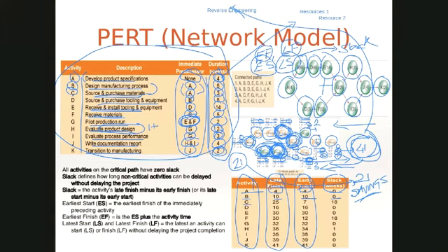C says latest finish is 25 weeks, and earliest finish is 7 weeks, which means it has 18 weeks of slack. So for the resources needed for activity C, you have 18 weeks of free resource timing where you can choose when to use them and when to let them go.